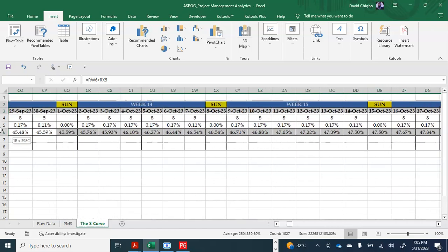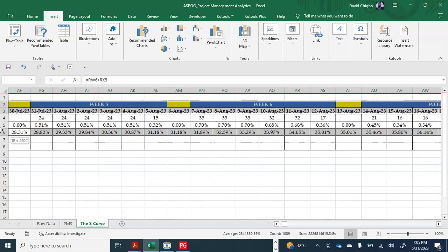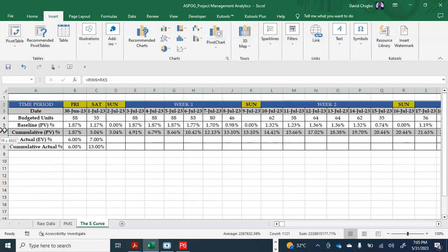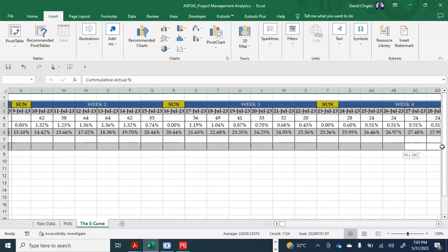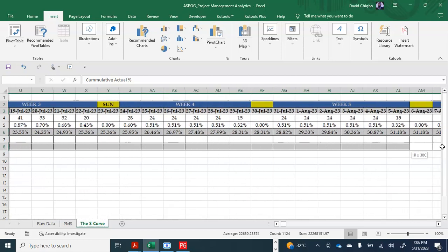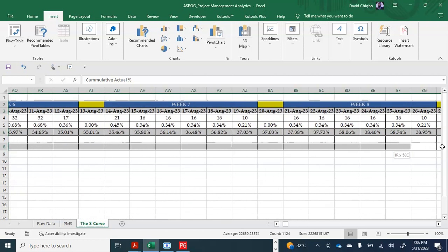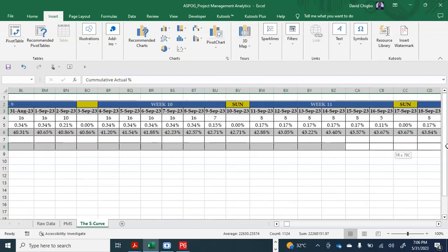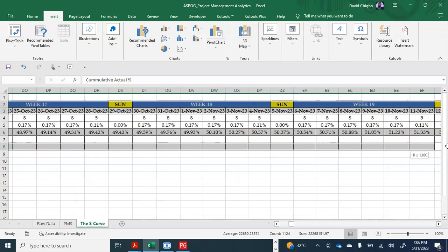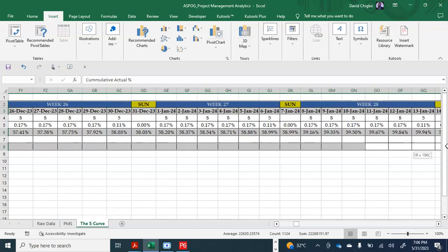It's not compulsory to balance the percentage as your end value. Whatever you earn, you put it there. Don't try to balance, because as time goes on, your activities are going to be dragging back. Sometimes you're not going to meet up to the percentage as planned. So you just leave it the way it is. Whatever you earn, you compute and add it. So it has to do with logical reasoning again.